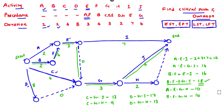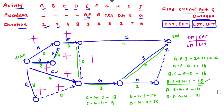Now we find EST, EFT, LST, and LFT for each activity. We put plus marks on all activities to record these four values. Starting from the beginning, EST = 0 and EFT = 0 + 2 = 2 for activity A. The EFT of a preceding activity becomes the EST of the succeeding activity.